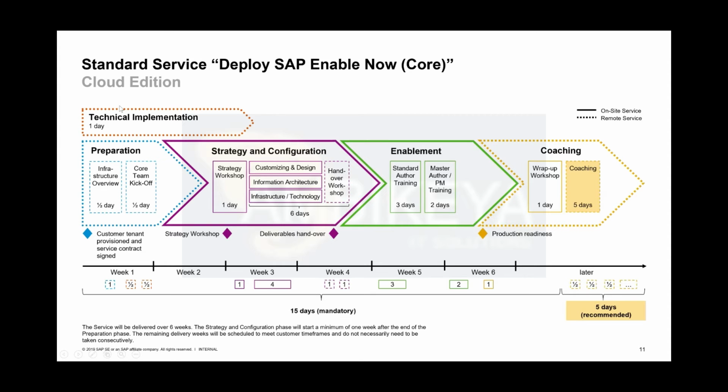The difference: on premise would always be 1 day on top for the technical implementation, for the physical manager installation and configuration, for instance. But still, we have a technical portion to do in cloud, consulting people on what the clients do, how the clients are downloaded, what we have to do from a security perspective to get the clients up and running properly. All this is in here.